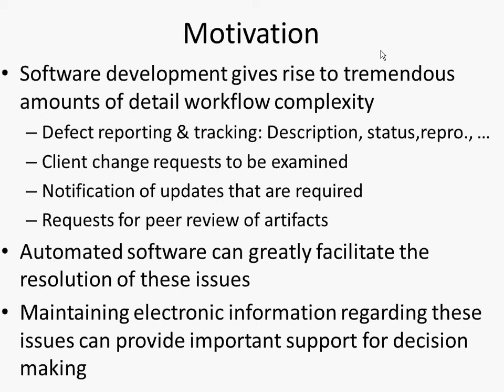Sometimes there are client change requests that come in. One of your clients might say at one point, 'You're giving me what I requested, but it's too confusing to do it that way. Let's split it into two screens.' So that might be a change request, and you want to record this, then go discuss what the implications are — how complicated would that be, do we really have time to do it?